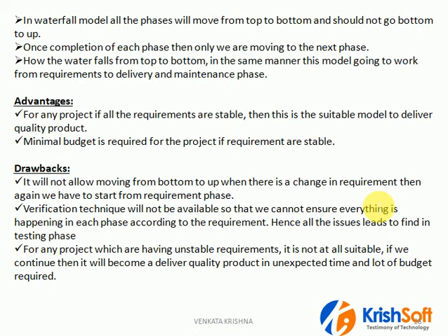So what type of projects is it suitable for? If requirements are 100% stable, nothing is going to change, then the waterfall model is very much suitable, because no requirement is going to change. Second, until the development phase, no tester is going to be involved.